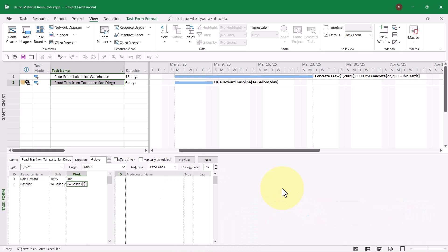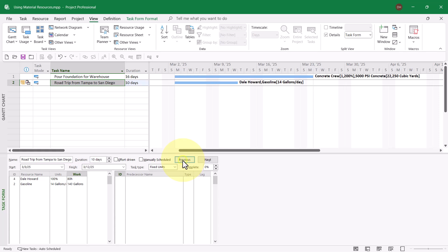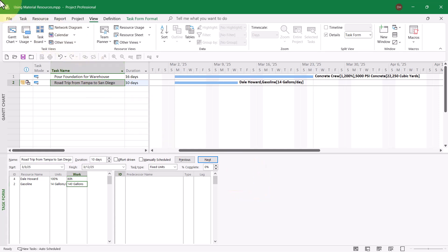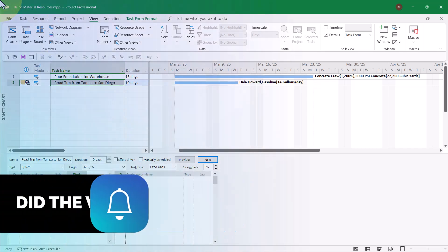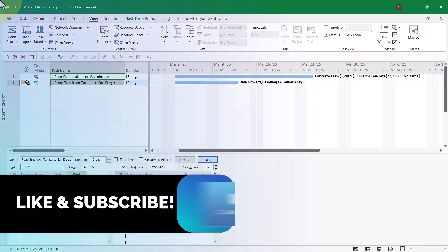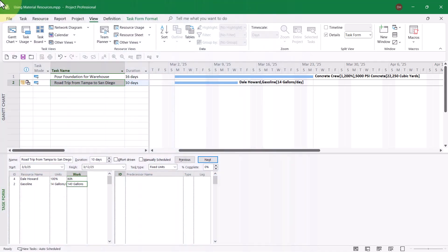However, I might take a couple side trips and spend a couple days around Flagstaff, Arizona and maybe a couple days around Las Vegas while I'm on my way out to San Diego. So let's pretend that the road trip now is going to be 10 days. When I change the duration to 10 days and click the OK button, notice now that Microsoft Project measures the consumption of the gasoline at 140 gallons. That's how the variable consumption rate works.